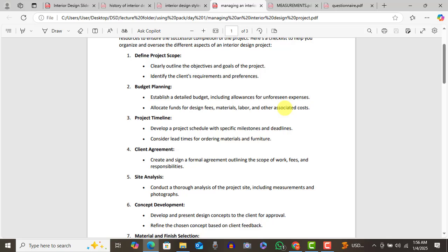Right. Now, in doing the budget too, you realize that because your work is mostly project management at this stage, you need to get your tiler. Let the tiler give you their estimates. You need to get your electrician. All these people, you take them to site too. You have to take them to the site, at your expense, so they can do their assessment.